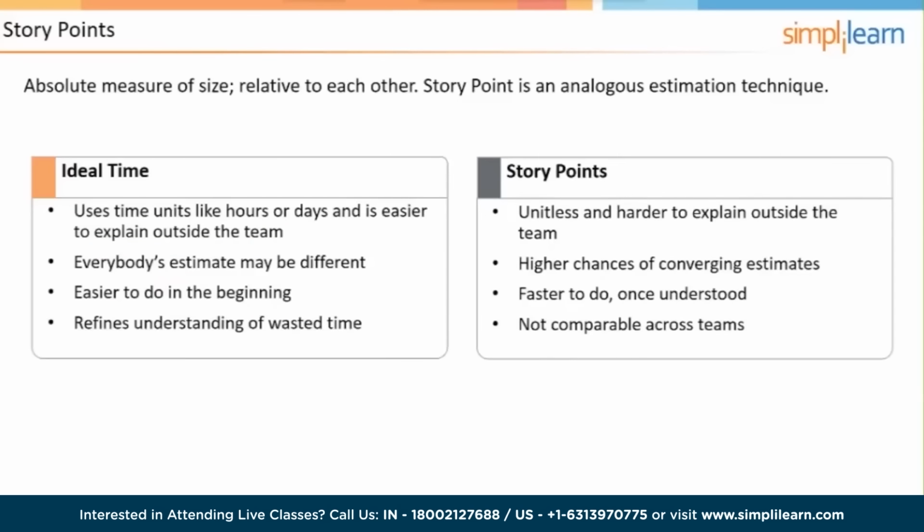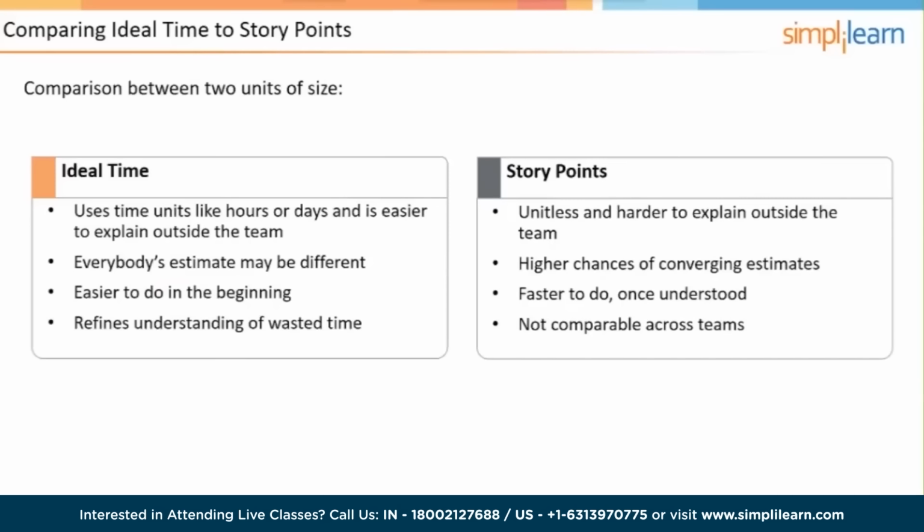Let's compare the two. Ideal time uses things like hours and days, which is easier to explain outside the team, right? The suits like things in days and hours. Everybody's estimate may be different, not a bad thing. It's easier to do at the beginning because we're oriented to think about time. And it does kind of shine a light on wasted time. Story points